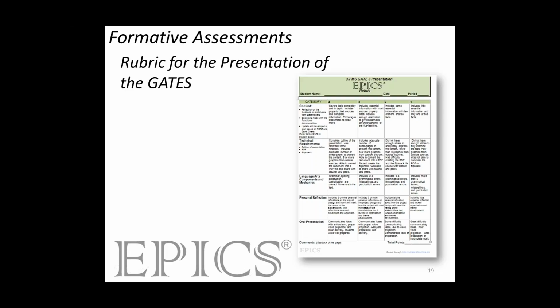So what a gate is, like I said, is if you think about, say, we're in the specifications phase we're talking about today. In that gate, before they can move to the next phase, which is where they're doing the detailed or conceptual design, they will need to have spelled out what the specifications are for who they're making their project for. They're figuring out who the stakeholder is.